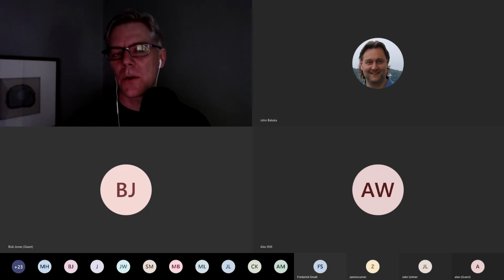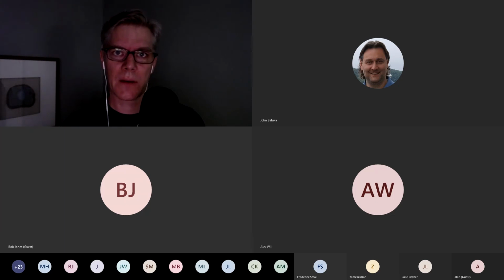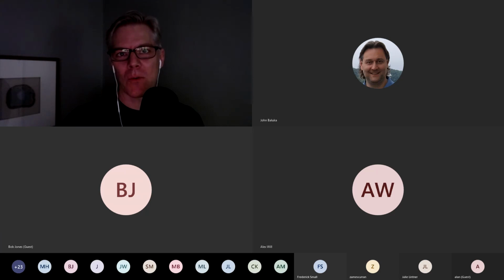And if you go and do that and you think, oh yeah, I'll do this for 18. I think the estimate's about $10,000. And now Stark wants me to add on a fixed price option to do all this stuff for 18,500. If your reaction to that when you try and do it is, oh no way, I'll get killed if I only add 85% on top of the estimate, what does that tell you? That should tell you that your estimate's way too low, because you are not even confident that you're within roughly double. You're afraid that the scope is so wrong that this client is going to drag you through the mud more than double what you're estimating.